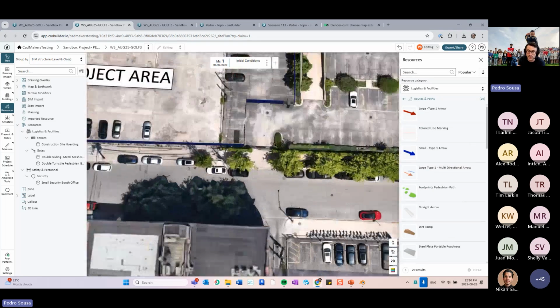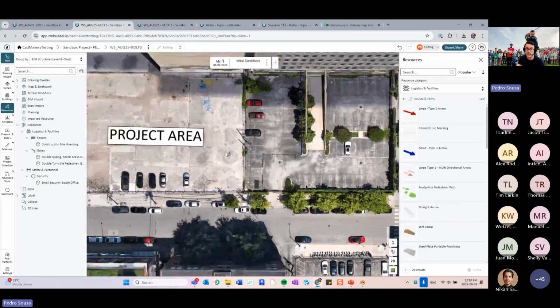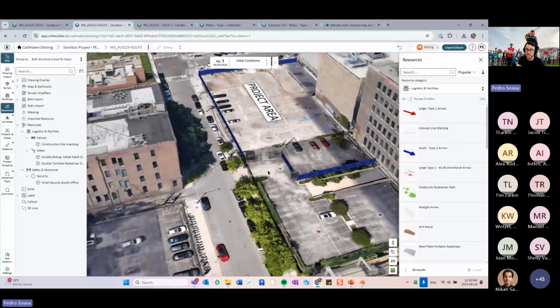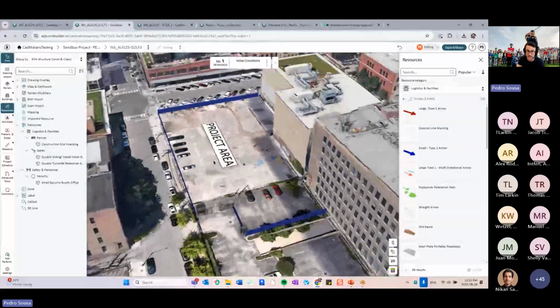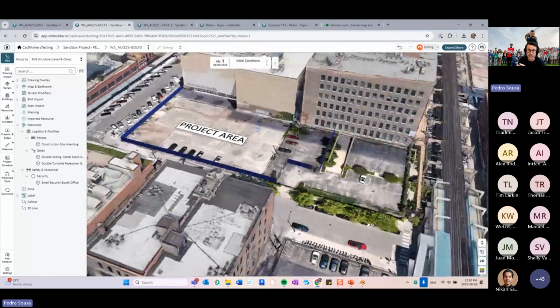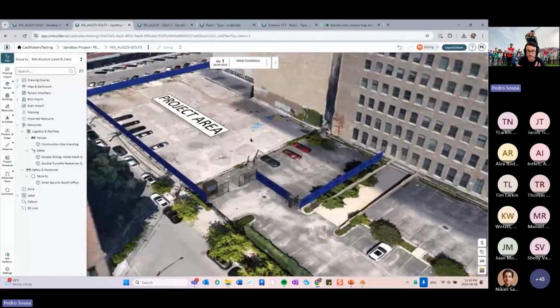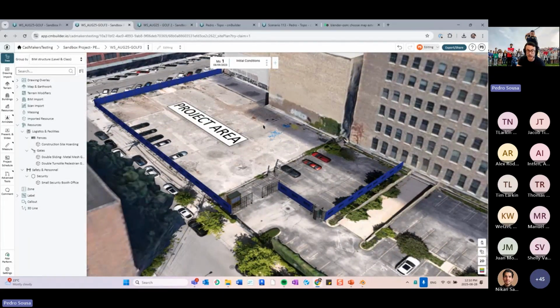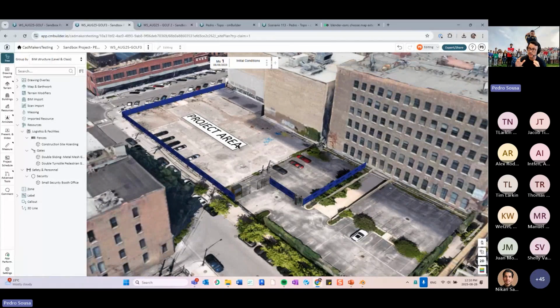One thing that is very important at this stage is also to represent where your emergency routes are going to be, like exits in case of an emergency, right? And one thing that I forgot to explain is that sometimes when you're doing your safety plan in cmBuilder, it might be interesting for you to create this in a duplicate scenario, so you can freely create your safety plan and adjust things, move things around, annotate, without having to worry about how this is going to look in your main scenario. Or you can create a whole milestone that is dedicated just for this, right?